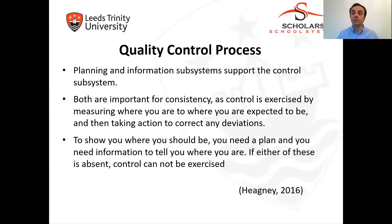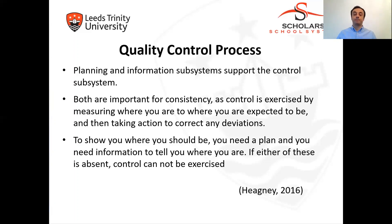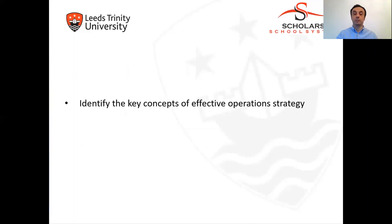We have the quality standard and we implement the processes as designed by the company. We get sample outputs from the process and measure actual outputs against standards. If it is fitting the standard, it's good for the company. But if it is not, the company is supposed to take some corrective actions. Most of these corrective actions are managed by a project team if there is a deviation or a critical mistake in a process. You need a plan and information to tell you where you are — if either of these is absent, control cannot be exercised. If there is a deviation, it's a whole process to be managed by the quality control managers.